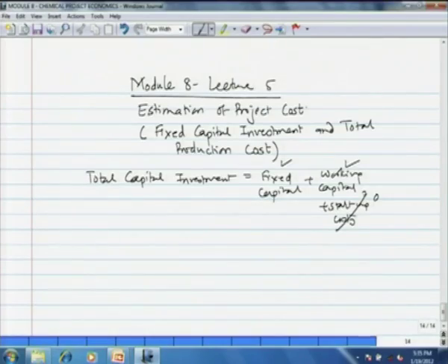The lower limit, let us say, could be for the battery limit addition, and the larger limit is for a new grassroots plant. Now, we concluded our previous lecture on the issue of cost index. The major component of fixed capital investment is the purchase equipment, which is about 15 to 40% of the total cost. Then how do we get the cost of purchase equipment?